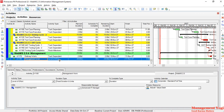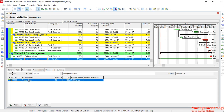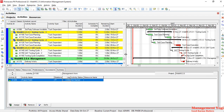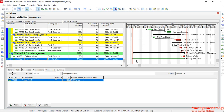Next we have the level of effort and the WBS summary. Scrolling to the bottom, we have a 'Management Work' activity which is a level of effort type. The level of effort activity is dependent on its predecessor and/or successor — the predecessor is the project start and the successor is the project finish. If I drag the divider to the left, you can see this activity hanging between the start and finish activities. If the finish date shifts, the level of effort line also shifts.